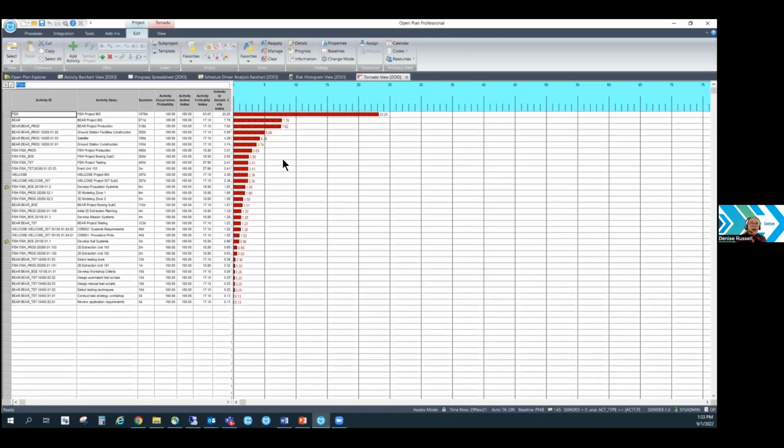And again, I'm doing this at the top level program integrated master schedule level. I can do all of these things on the individual files that I have received from my subcontractors or my vendors or my partners, and do the exact same things on there. If I have them linked into an input milestone in my schedule, I can run a driving path to that milestone and see if what they're telling me is the critical path for their work, to see if that's truly going to be the critical path to meeting up with my milestone. So I have the ability to do this at all levels.